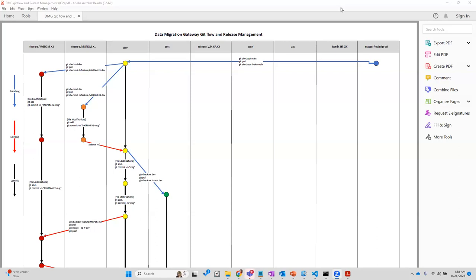And there will be a daily call, a daily 15-minute stand-up call, where you have to tell what you worked on yesterday, what you are going to work on today, and whether there is any blocker. Only three things: what you worked on yesterday, what you are going to work on today, and are there any blockers. If there are any blockers, the Scrum Master will connect with you afterwards and provide help. Okay, so that's how the project works in the agile methodology, and it's evolving.